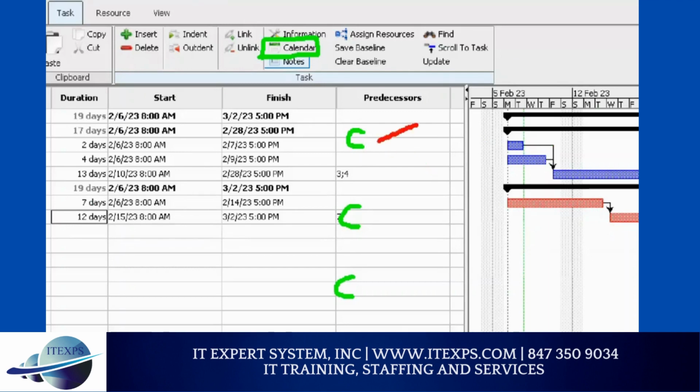So there are 3 calendars. These are very profound things. No one will explain this, but it's so easy. One calendar is the country calendar, where they have national holidays. One is called the company calendar, where they have company holidays and national holidays, right?